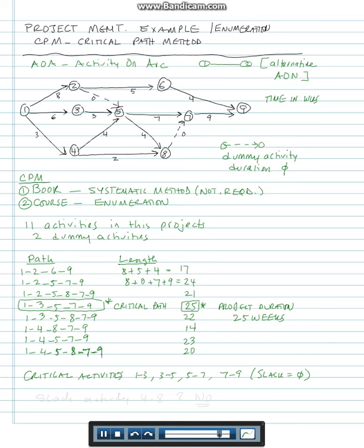That's the whole point of doing CPM: having management focus on a small number of tasks and make sure that they don't slide and they get done on time, so that they don't focus on the entire number of tasks, but on the critical activities and make sure that they finish on time.